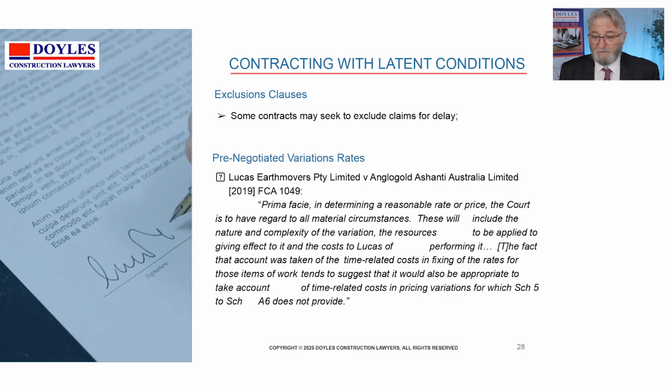It would have been more sensible to have a different way of calculating the cost, which would have perhaps been referable to the size of the pump and the effort involved rather than just to the litres. Eventually he was able to negotiate a good solution, and he benefited by thinking quickly at the time.